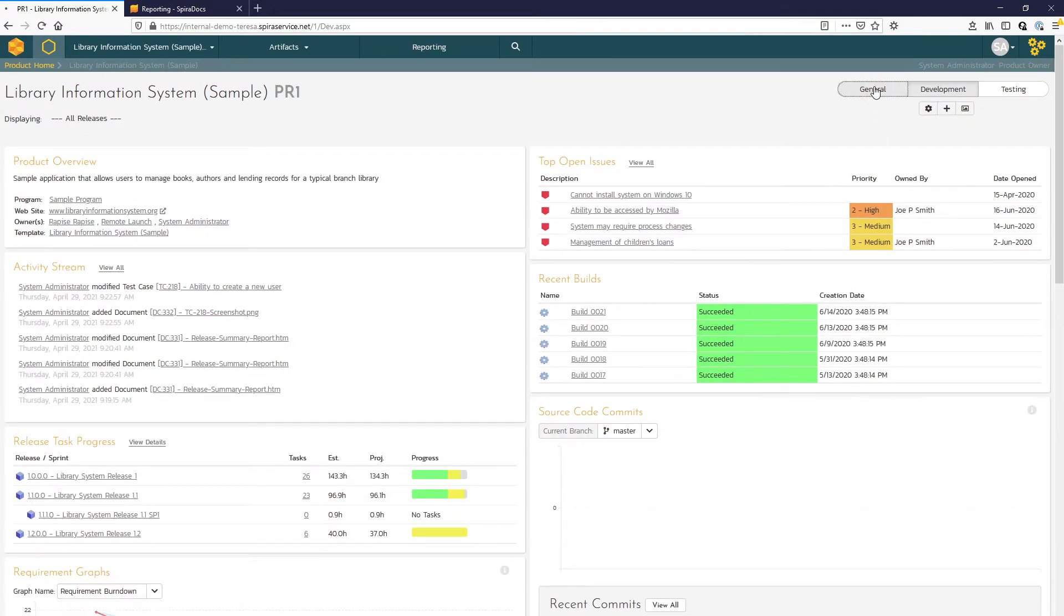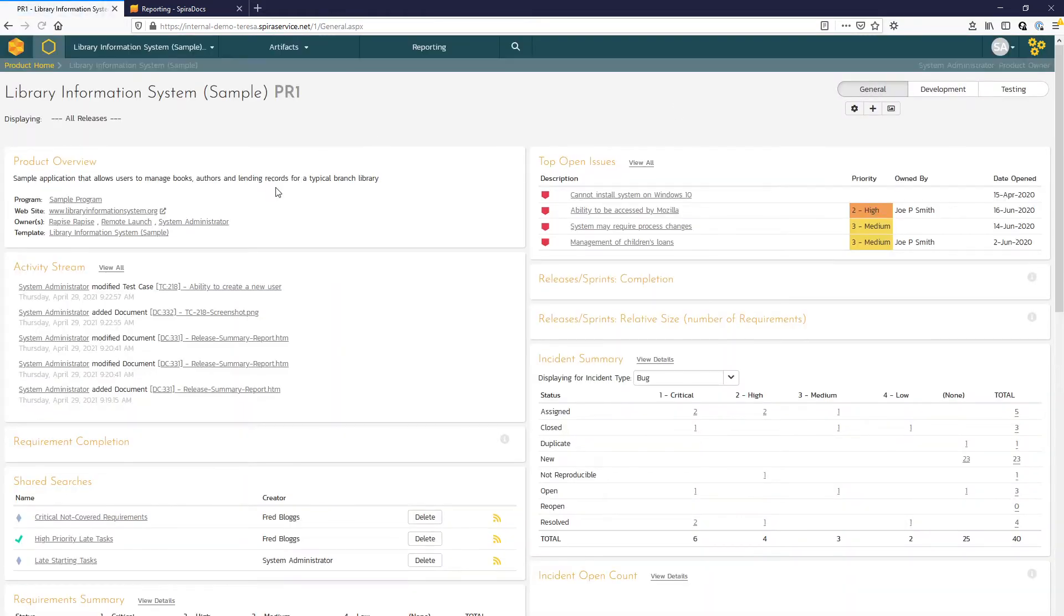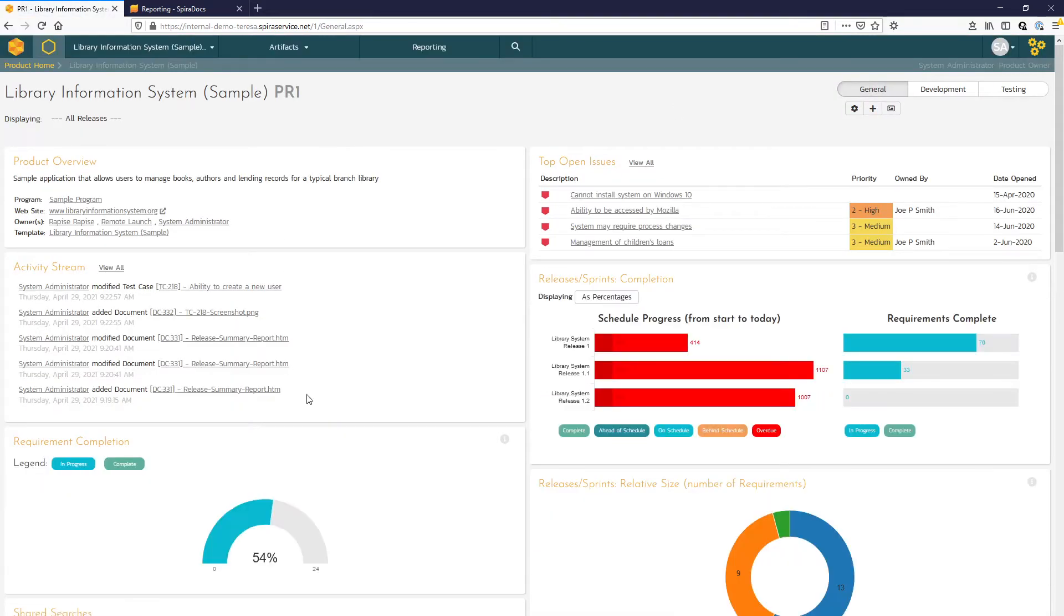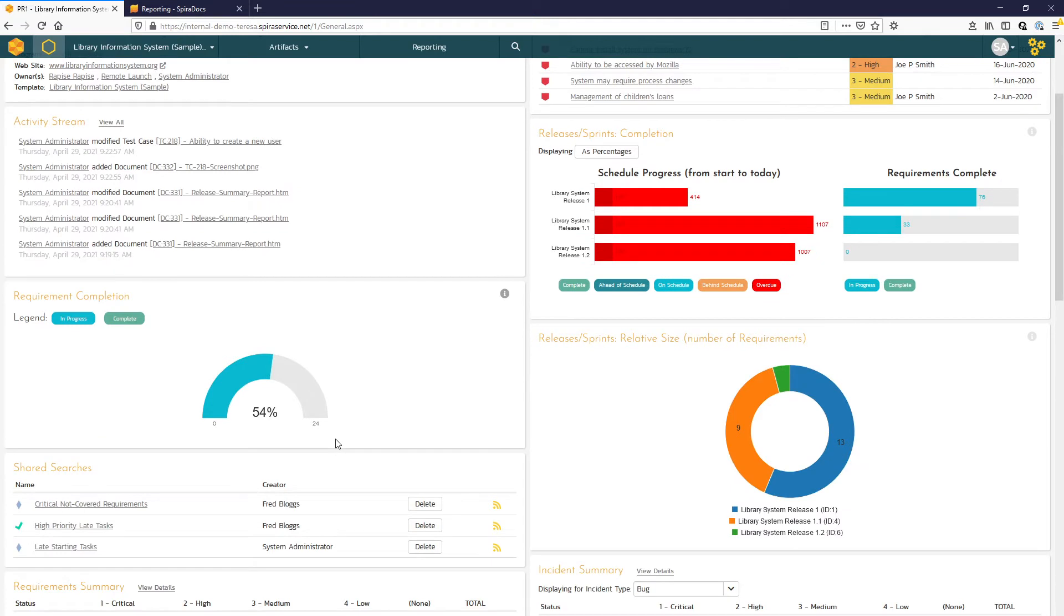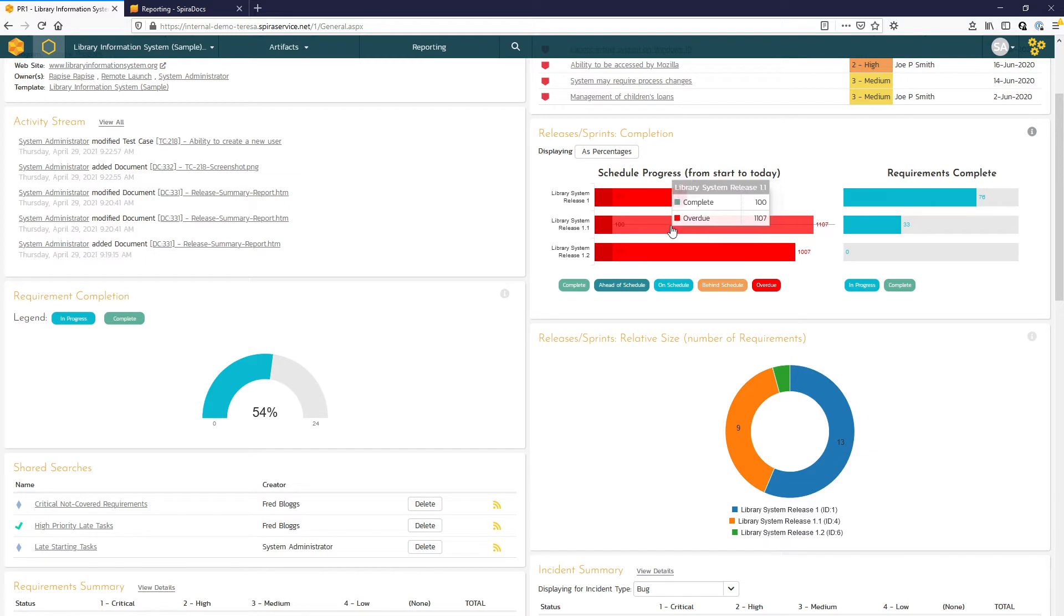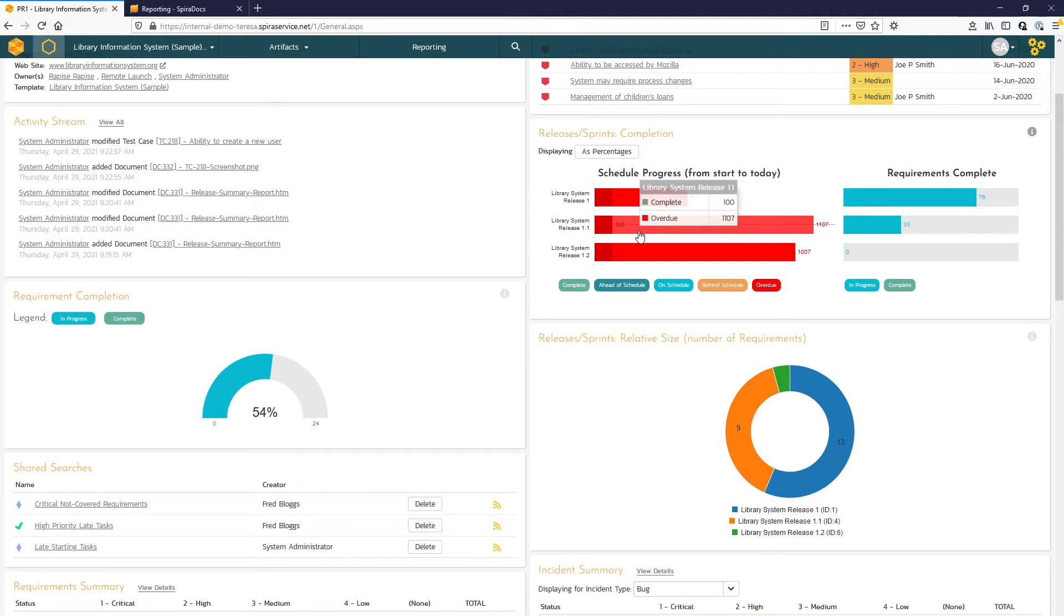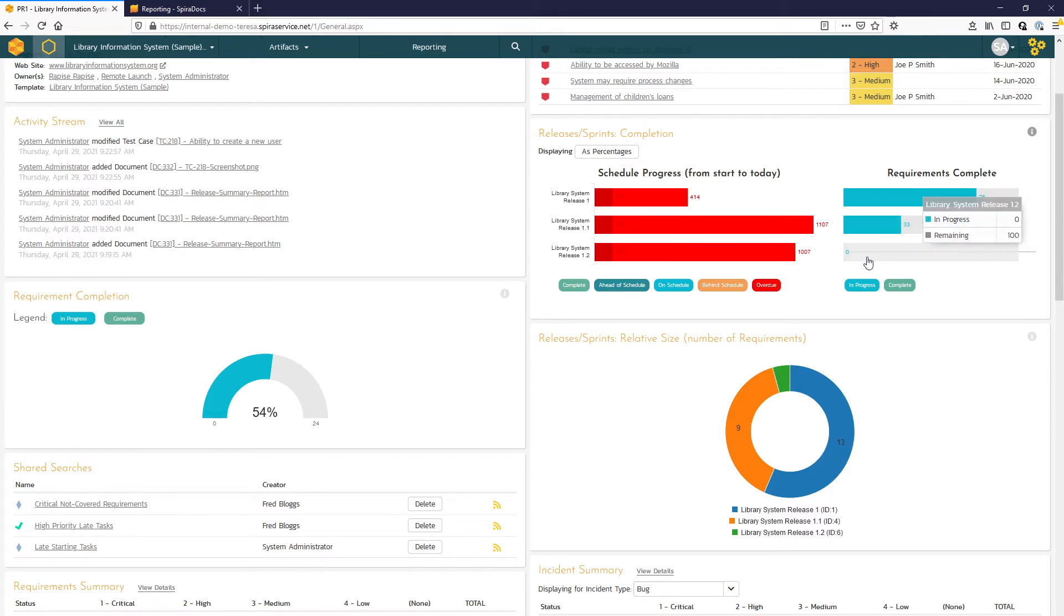Moving then to the general view, here we can see our overall requirement completion for all the active releases or sprints within the product. We can see the relative size of releases and sprints and then where they are on the schedule. Here you can see that this sample data is in the past and so we're showing red here because those releases are overdue. And then we have the requirements completion stats for those individual releases as well.